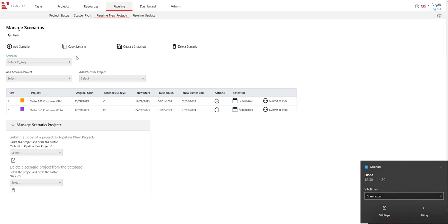So rather than starting today, so today is the 8th of September, we delay it a couple of weeks here, which means that these will not interfere with the ongoing projects, but it will still meet the need, which is before March 1st. Okay, so when we have now decided this, we can reschedule these.